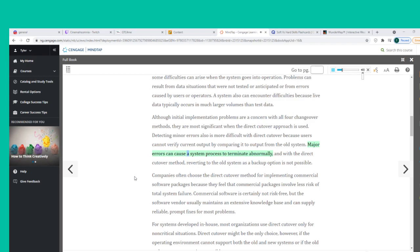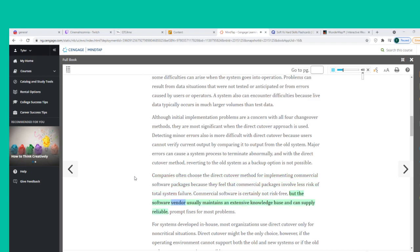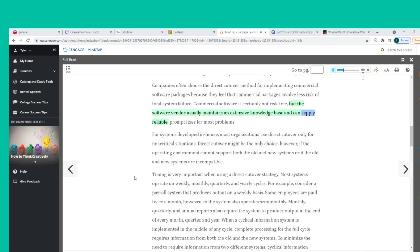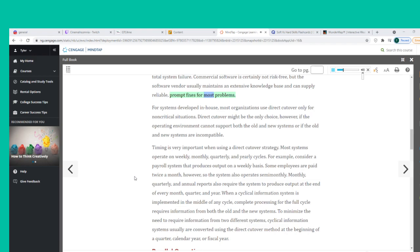Major errors can cause a system process to terminate abnormally, and with direct cutover, reverting to the old system as a backup is not possible. Companies often choose direct cutover for implementing commercial software packages because commercial packages involve less risk of total system failure. For systems developed in-house, most organizations use direct cutover only for non-critical situations. Direct cutover might be the only choice if the operating environment cannot support both the old and new systems or if they are incompatible.